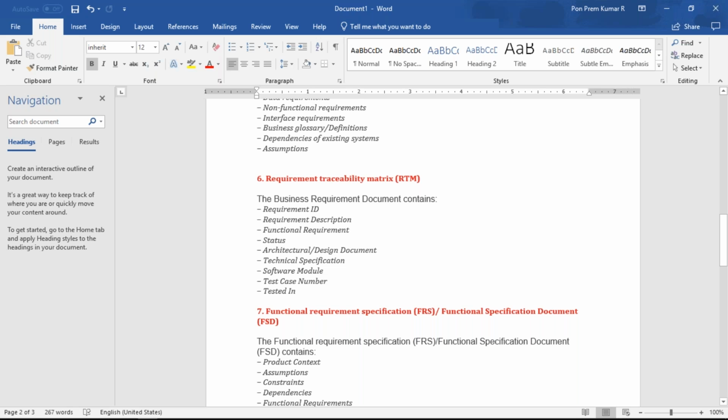No Word document is required, but still you can do it in tables, which list the complete user and system requirements for the work, which in turn map to the respective documents like FRD, design document, software module, test cases, etc. This document is maintained for the life cycle, SDLC purpose, and the various releases in the project. It is a very important document to track the project scope, requirements, and changes in the product.